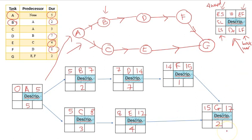And as for the backward pass, we're going to do it backward. We're going to calculate the LS and LF. So for the last activity, this will be 17. The LF will be the same as this. And how to calculate this is just simply 17 minus 2. You will get 15. And this 15 will become the LF for the previous activity.